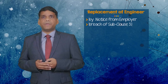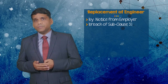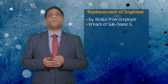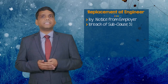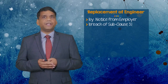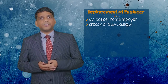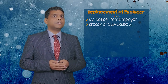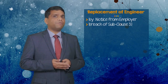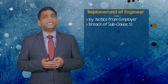The contractor may object to such a replacement within 14 days after receiving the notice of replacement. If no notice of objection is given, the contractor is deemed to have accepted the replacement. On the other hand, the employer will not appoint the proposed engineer if a reasonable objection is raised by the contractor within the 14-day time limit. There is no provision for the contractor to request replacement of the engineer under sub-clause 3.6. Yet, if the contractor finds the engineer incompetent, he may allege that such incompetence constituted a breach of sub-clause 3.1's requirement that the engineer shall be suitable, qualified, and competent. A similar approach may be used by the contractor to replace the engineer's incompetent staff.